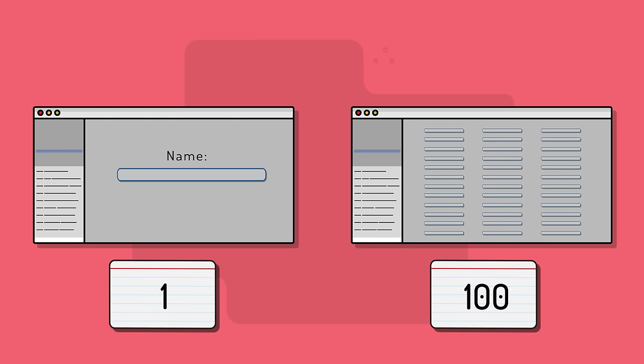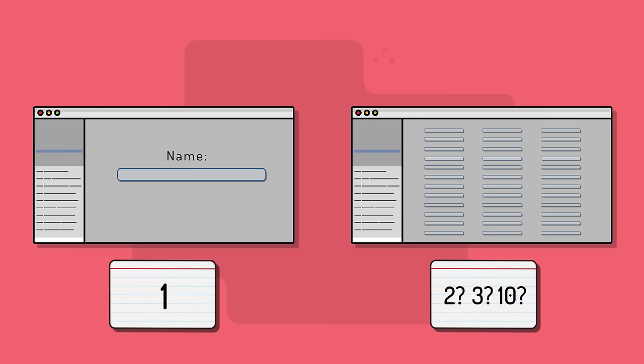It probably doesn't get 100 times more points, even though there are 100 times as many fields. There are, after all, economies of scale, and maybe making the second page is only two, three, or ten times as much effort as the first page.